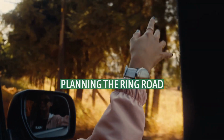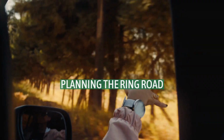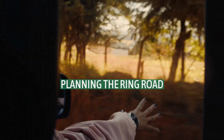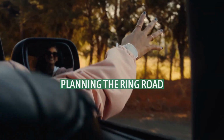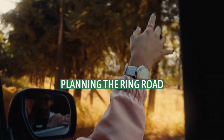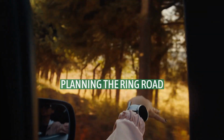The government had reduced investment expenditure significantly from late 1955, and in 1956, the Ministry of Transport and Civil Aviation, MOT, denied the council permission to build the entire road, indicating that only the southeastern portion was likely to be approved at that time. Despite this, the council in 1957 approved and submitted a plan for the full route, divided into 6 stages, with a time estimate of 6 or 7 years.